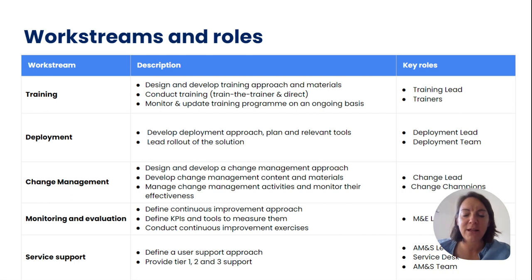And finally, the service support workstream, which does need to be defined and set up actually quite close to the beginning of the project to make sure that the team who are responsible for this can learn during the pilot and scale-up period and then be confident when they are full-time conducting operational support.